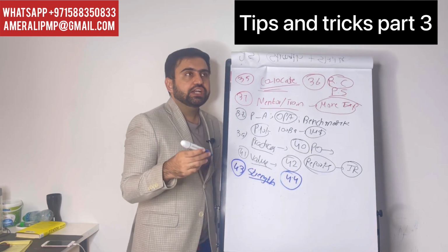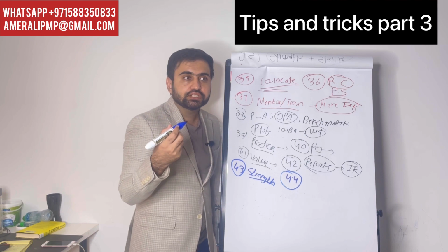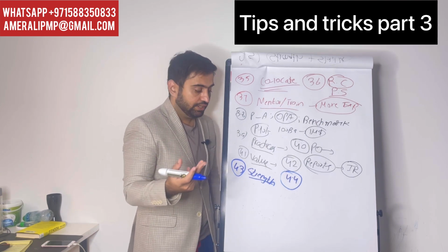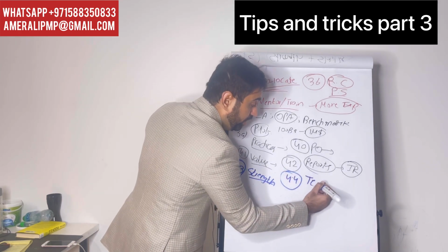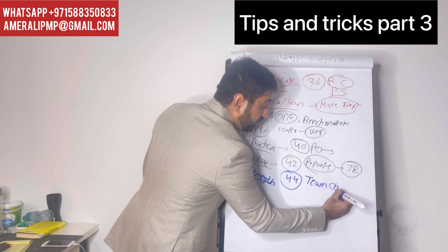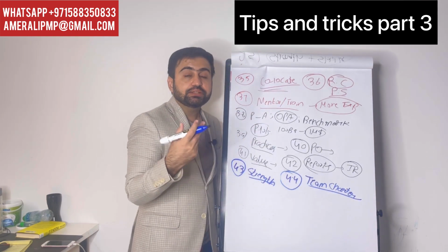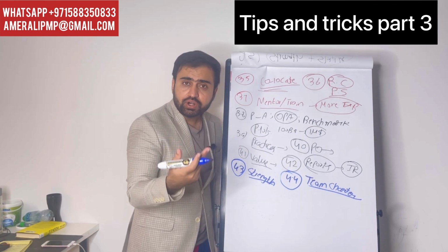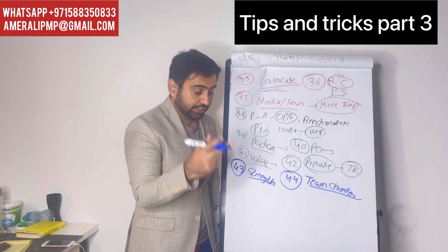If the Agile team is having any difficulty, if a stakeholder is arguing in the meeting, or if any team member is not performing well, then look at the team charter. That can be called a social contract, or a working agreement, in the question. The team charter will talk about how you handle these things, how you handle conflict and decisions. All these things should be in the social contract, the team charter.